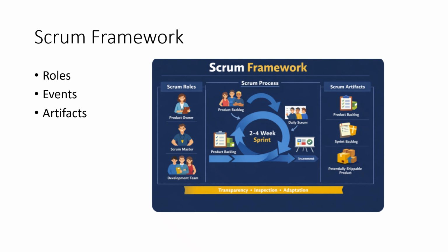The Scrum methodology prescribes breaking a project down into sprints that typically only last 1 to 4 weeks. Each sprint ends with the completion of a workable version or draft of the final project deliverable. Scrum's short iterations enable the team to continuously deliver a working version of the final product.